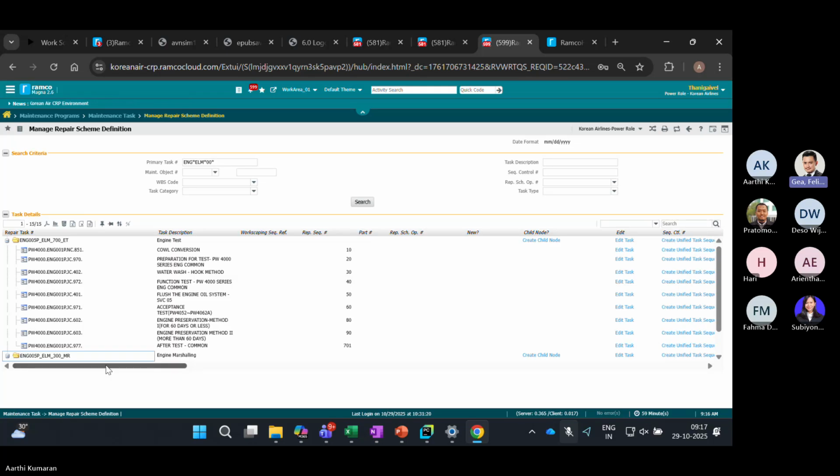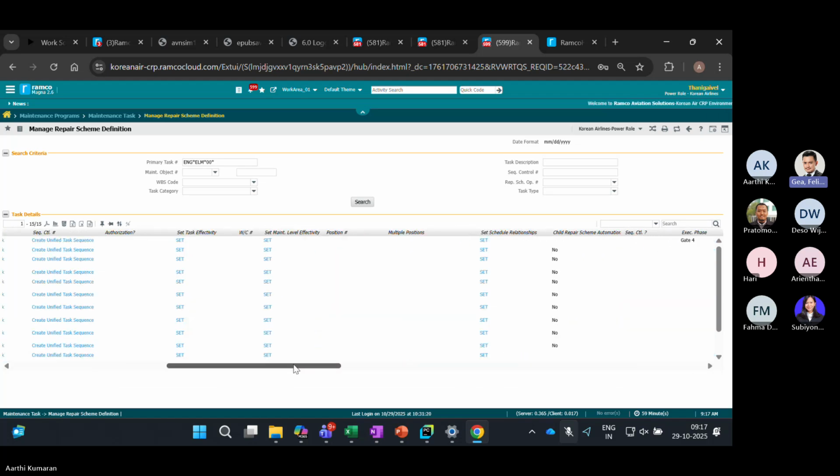First you find the task. Yes, you create a group task, and you map all these tasks that you've extracted from your manual within your group task and provide a sequence to them. The system will first assume that they have to be performed one after the other, which means it takes them on a finish-to-start basis. But case by case, if you think it has to go in parallel mode, that is something you can manually intervene and change.